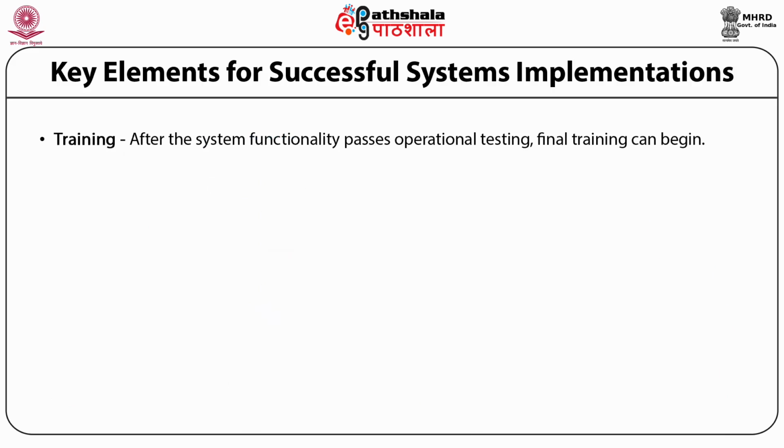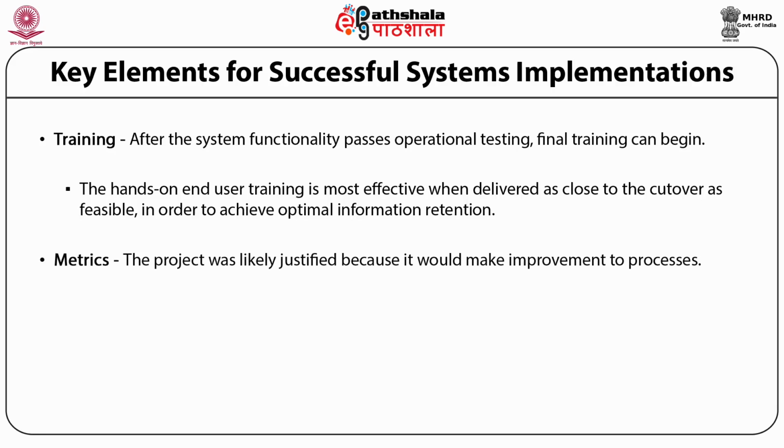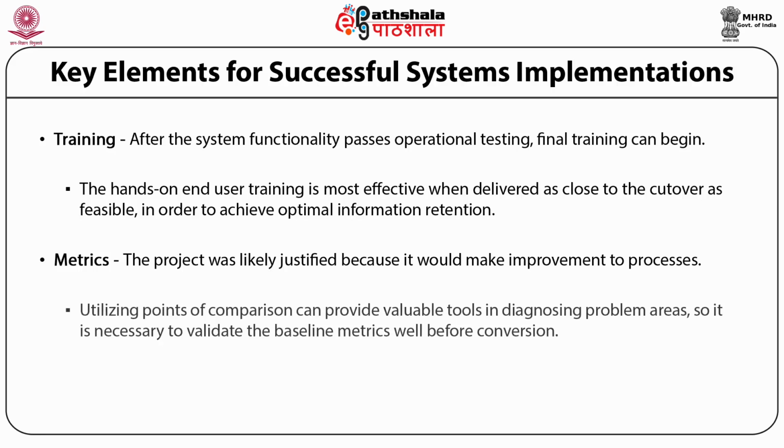Hands-on end-user training is more effective when delivered as close to the cutover as feasible in order to achieve optimal information retention. Metrics. The project is likely justified because it will make improvements to processes. Utilizing points of comparison can provide valuable tools in diagnosing problem areas, so it is necessary to validate the baseline metrics well before the conversion.